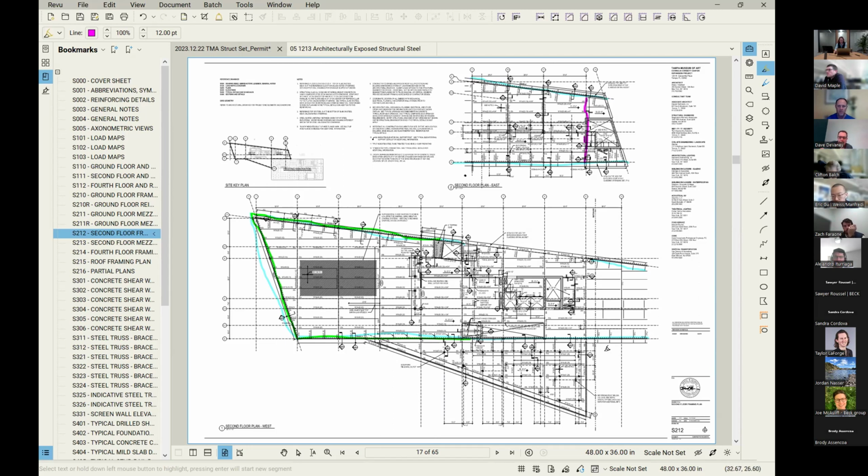In the back of house, delegated connection design zone, we expect there will be gussets and bolts. As far as restrictions to the size of the gussets, I don't know of anything offhand. I imagine that will be part of the detailed clash detection exercises on the contractor end, to make sure there's no conduit or pipe trying to route through a space that ends up getting occupied by a gusset. That's the only thing I can think of off the top of my head. It's a very general question, Alejandro, but I hope I've answered at least part of it. There's no gussets in the exposed area.